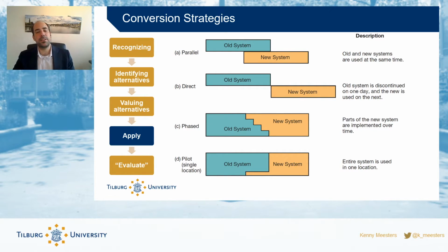The pilot is actually something that could be a bit easier. For example, think about the university, where a couple of classes that don't have much relationship with other activities start using a new system. Last year we transferred from Blackboard to Canvas, and a few courses were using Canvas while the rest were still on Blackboard, and later last year we all transitioned to Canvas. So that way you use a few people as a pilot, so only a few people have to do double work, not all of them, or you use something that doesn't have a relationship with other data in the system.